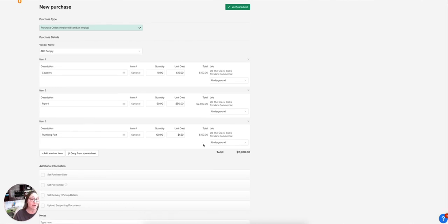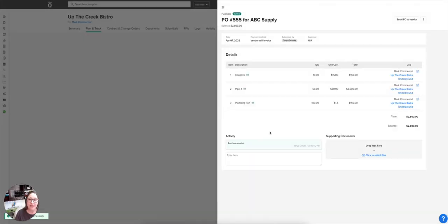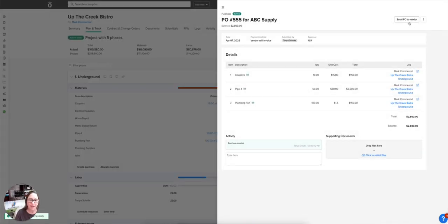Now we could and may eventually do a whole other series on purchasing and Knowify, but suffice it to say, you can see how pretty quickly and easily we can take what might have been on a takeoff that has been uploaded into this job and create a purchase order out of it that can go out to our vendor. Once I verify and submit that, I have all kinds of ways that I can get that to the vendor, including email and other aspects of how I can do that. And again, that might be a whole other series to get into about doing purchasing. But now then, we have created a purchase order which will now show committed costs against this project.